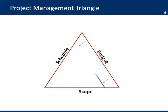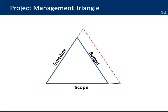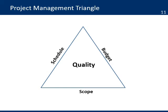The same thing happens when you are asked to reduce the budget. You need to look at the impact on the schedule and the impact on the scope when the amount of funds is reduced. In order to bring the project management triangle back to balance, you need to make a reduction in the schedule and reduce the scope in order to meet the new budget limit. You now have a new triangle — with the reduction in budget, you reduce the scope and the time to complete the project, so that in the end you can meet the quality standards.